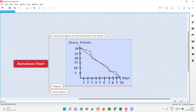At around 3.5 days, the ideal line shows about 9 points should be completed, but the team might have completed 11 points — so sometimes the team is ahead. Around day 5, the ideal and actual points may match. So sometimes the team is lagging, sometimes ahead, but by the end of the sprint — 10 working days — all 30 user story points have to be completed.